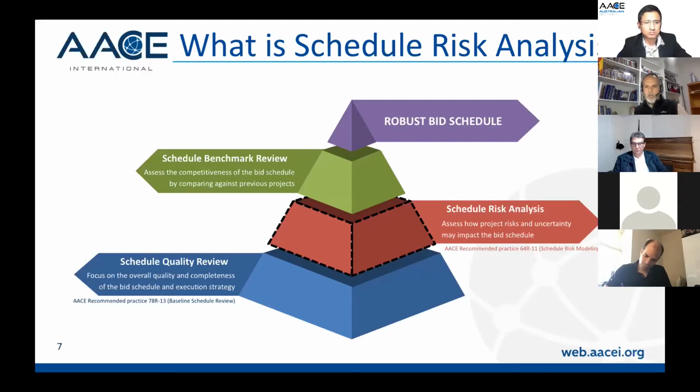And then, when you're doing your risk analysis, the next step is to do a little bit of benchmarking. So just to assess and validate the schedule using historical data, whether it's internal or external, or sometimes you are the owner and what you want is somebody to do an independent validation of your schedule before you move to the next gate.